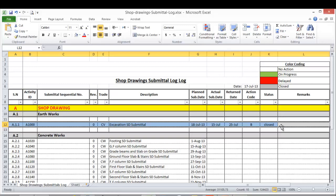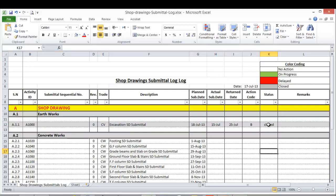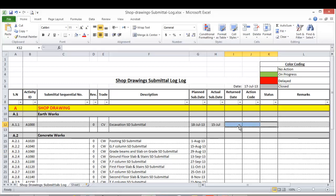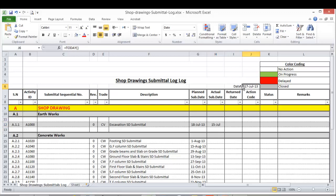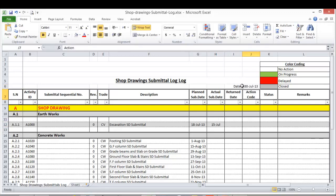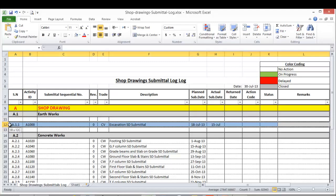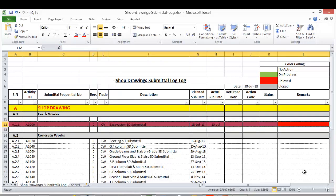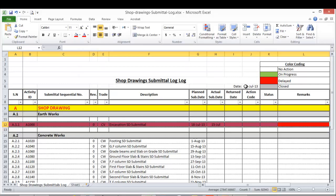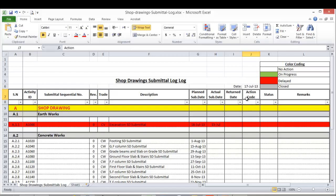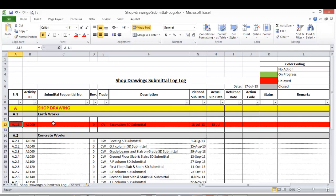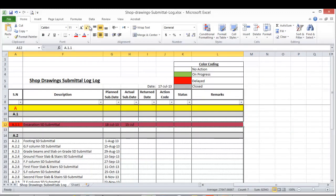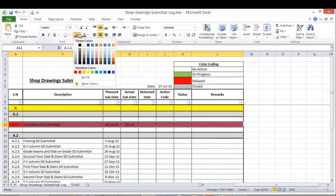If I assume that I send it to the consultant on 15 July and today is end of July, and I didn't receive any response, in that case I will mark it as red - this is delayed. If the data date is 17 July and still within the period of review from the consultant, so this means in progress. This is just a color coding I prefer to use so easily you can monitor what is the status of each drawing.